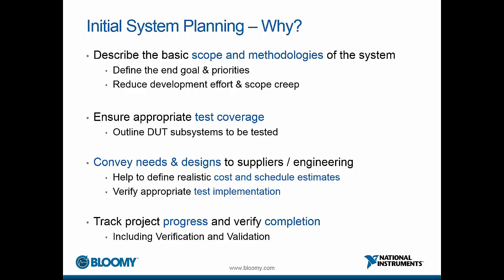While it may not be the most exciting part of the project, initial planning is critical to its success. With a solid plan, we can narrow down and define the scope and methodologies of the system, allowing us to reduce development effort and keep a better handle on scope creep. It's very difficult to isolate scope creep in the middle of a project unless the scope is well defined from the start. Including test coverage into our plan will ensure that all functions of the unit under test are covered and that unnecessary tests are not performed.